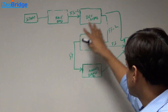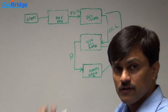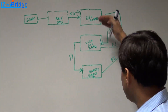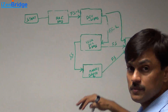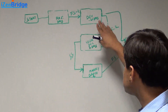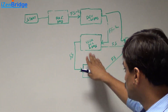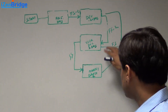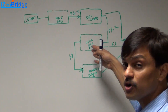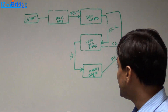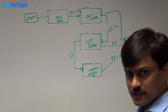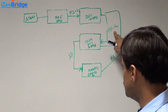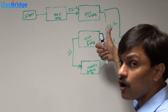Once the development is finished — and development includes design, development, testing, everything — it will produce a ready product. We have a finish-to-finish relationship with the user documentation activity. As development is finishing, we want to finish the user documentation also. But we also want user documentation to finish 2 days ahead, because at the later stage of development we don't expect too many changes on interfaces. So we have a finish-to-finish relationship with 2 days of lead.